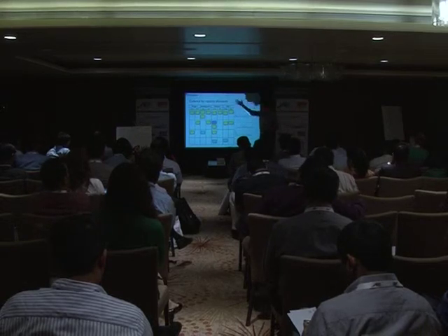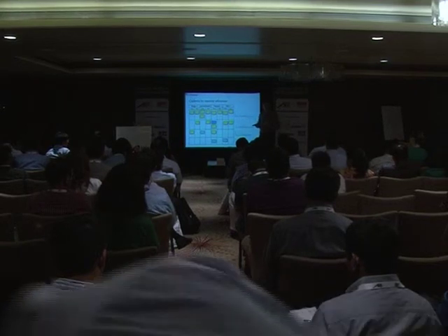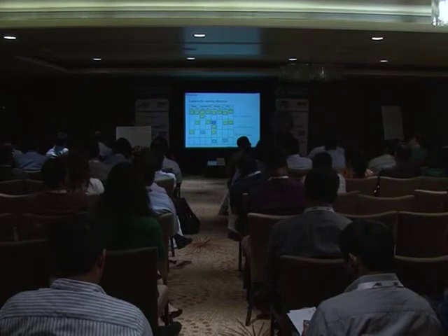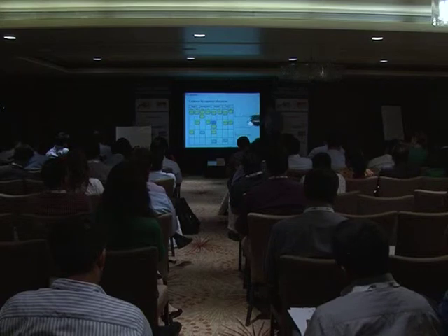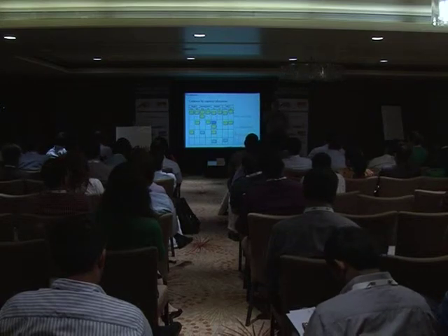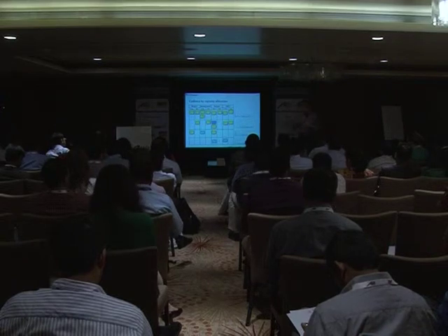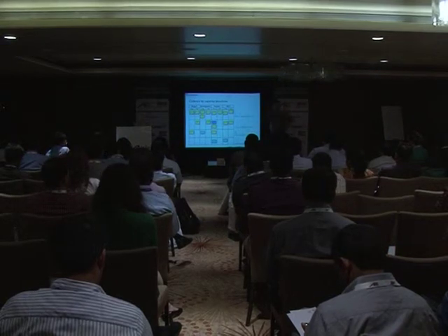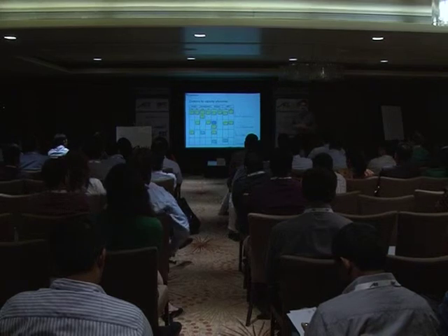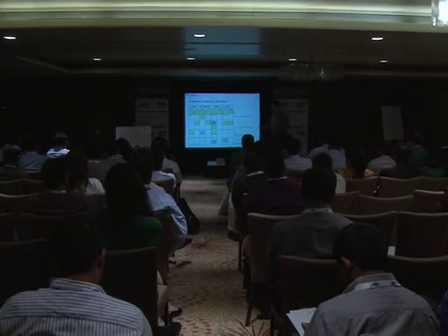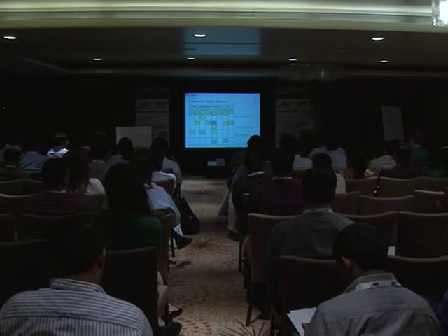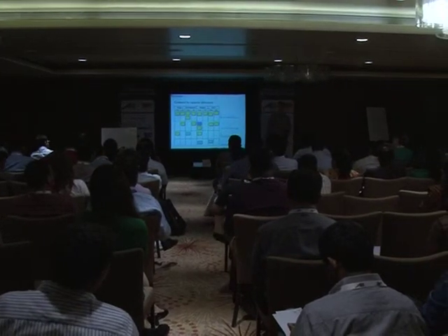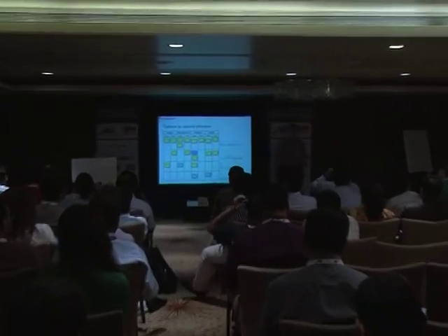Or we could say we have, for example, for a project, capacity allocation. So one team is working on this, another team on this, and these are other tasks, like defects, infrastructure, whatever. And we quantify. And we could say, well, if we assign a specific kind of functionality to team one, and we understand the way that team one behaves, then we can make a promise based on that. So we could tell the customer, this kind of functionality is going to be delivered to you every 9 days or less. This other kind of functionality is going to be delivered to you every 5 days or less. And this work, we're always going to make sure that it's done every 48 hours or less, and this is done every half a day or less.